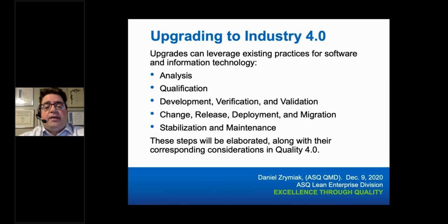Once those are captured and there's consensus and agreement across the necessary stakeholders, there has to be a qualification stage, both internal and external, for not just the technical solutions, but the partnerships and the arrangements with those partnerships. The best technical solution from the best provider comes up short if that provider is not willing to offer timely support. In contrast, something that is a very good commercial solution but is off the shelf and not customizable may be missing key features or may give an imbalanced solution. So qualifying ensures that you have a suitable arrangement of technical solutions and support that map back to what your ideal intended solution is.